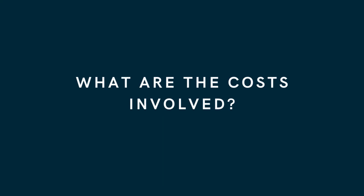And in addition to the savings, as I mentioned before, there's also a resultant reduction in CO2 emissions, so it's also beneficial for the environment. One important thing to add though when looking at the costs is that you would require a building warrant for the installation of an EWI system, and that's to ensure that the system is specified and installed safely and complies with all current regulations, including the fire regulations. So Graham Sibbald have of course got an architectural department, so when instructed on EWI projects, we can take care of this aspect for our clients and provide them with a full in-house service.